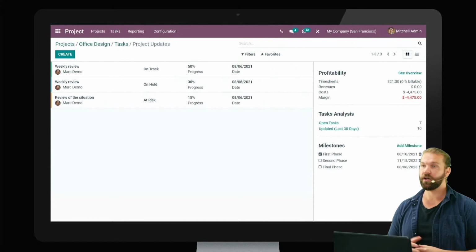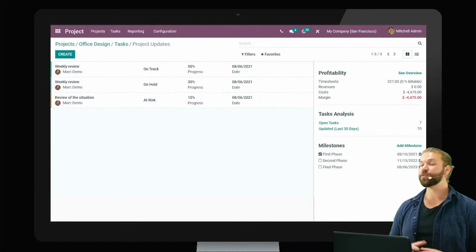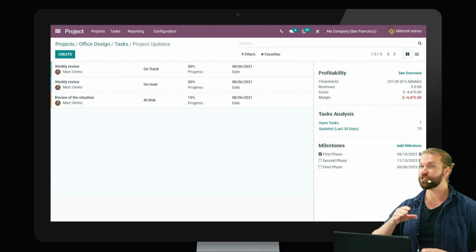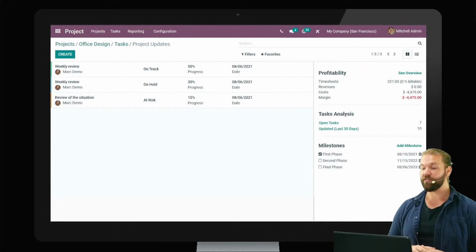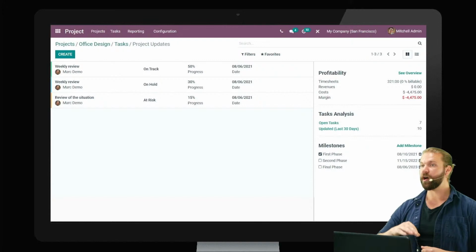So you can see, okay, what's the momentum look like here? Then now we have something even cooler, the milestones. In the past, we didn't have the ability to add milestones, so now we do have this. So you can add as many milestones as you want, remove them. It will sort them by alphabet. However, typically milestones have a deadline, so that will be the main source of formatting, or I guess sorting. And it will do that automatically for you.